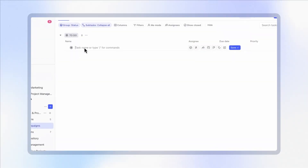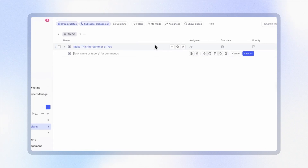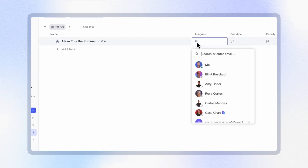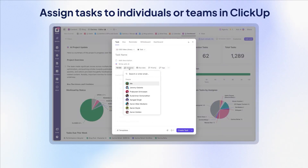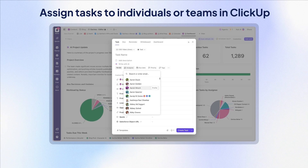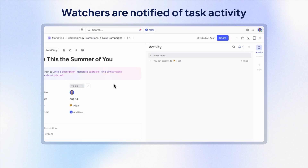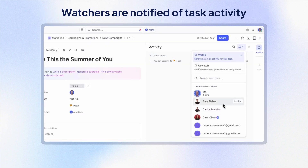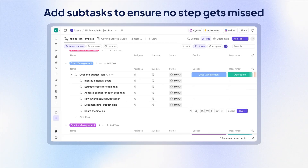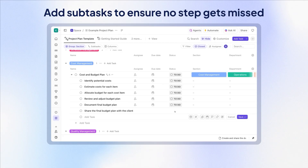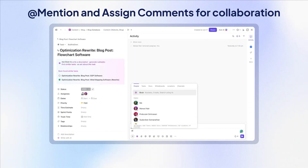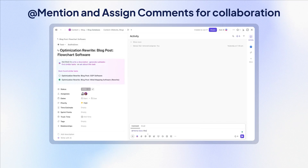For step four, we need to define who's responsible for what by assigning DRIs — a directly responsible individual for each task. In ClickUp, you can assign tasks to specific owners or even an entire team. Then add watchers who are notified of task activity, and add subtasks to ensure that no step gets missed during execution. If you're working cross-functionally, you can also at-mention collaborators in the task or assign comments to them to keep the conversation in context.